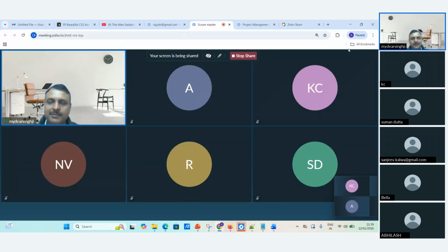If somebody says, okay, these two phases, initialization and prototype design, you can do in predictive, and when the actual development happens, I'm going to use Agile. That is possible, and that comes under the hybrid way of working. Some of the part we do in predictive, and the main and major part we do in Agile. So that comes under hybrid.